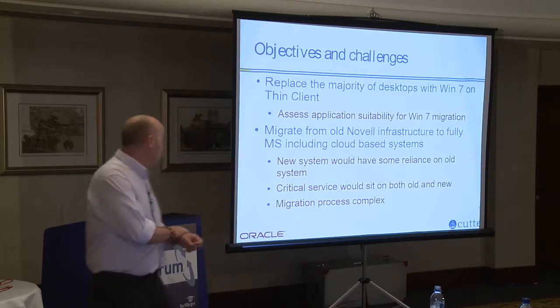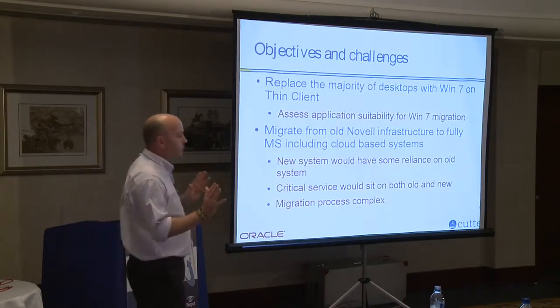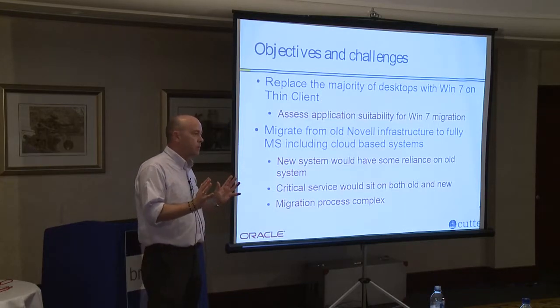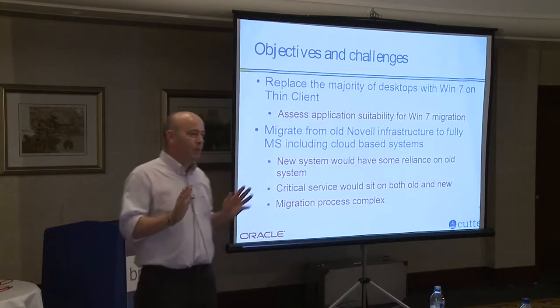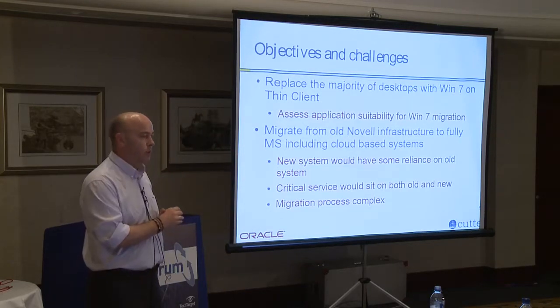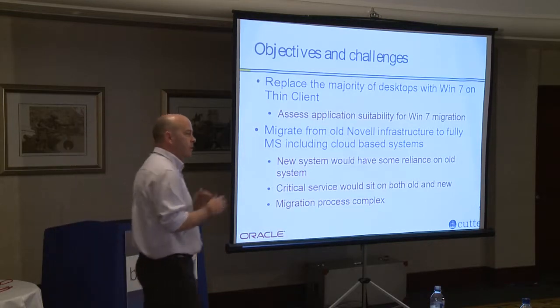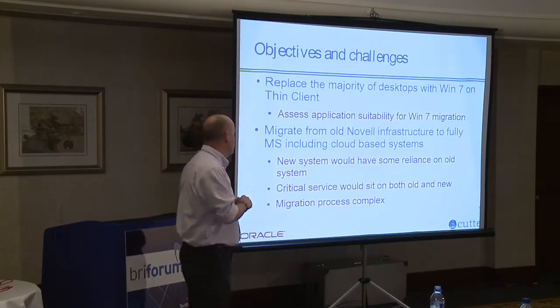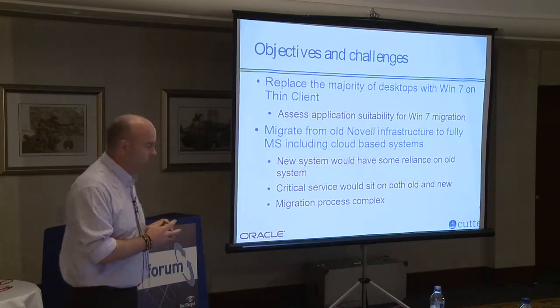And interestingly, one of the things that's done, and we're finding this quite regularly as well, is this Windows 7 migration is an opportunity to do a rationalization of your application stack. A lot of your users say, I've got to have that. I've got to have it working. Well, when was the last time you actually logged on and used it? 2009. You really, really do need that then. So there was a consolidation exercise went through with their application stack, and there was a reasonable amount that was shaved off from that side of it.